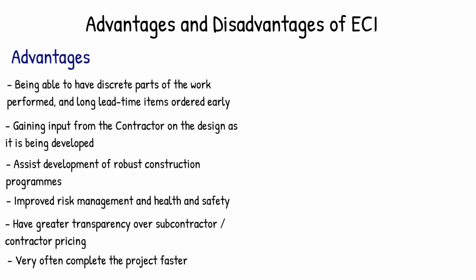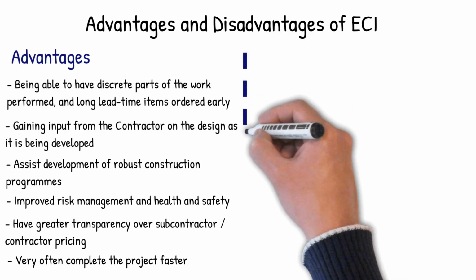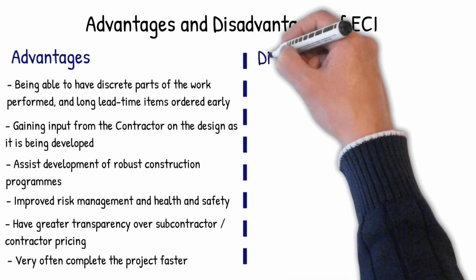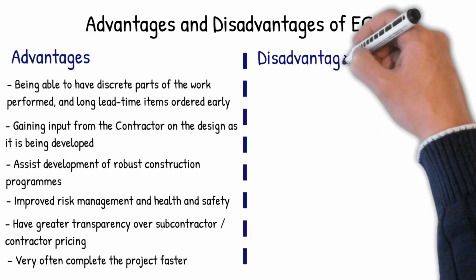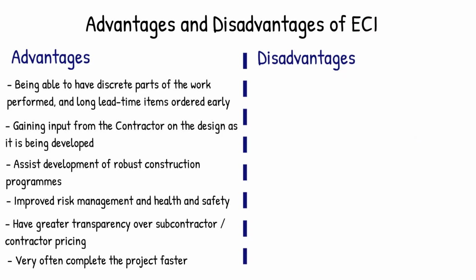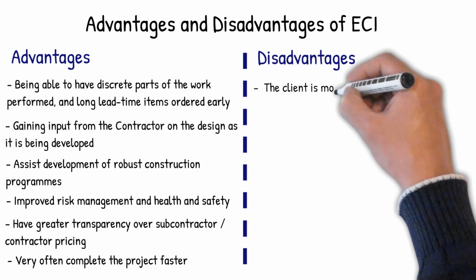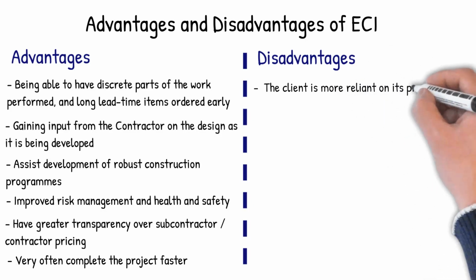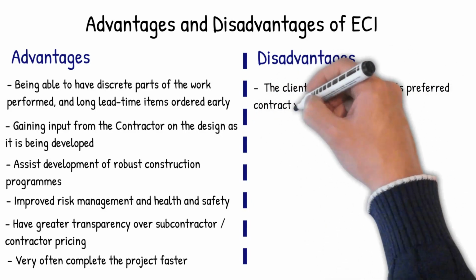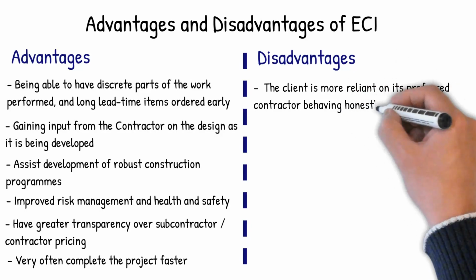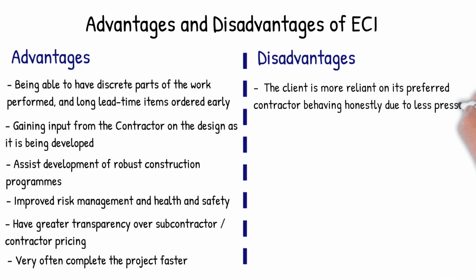Despite all of the advantages of ECI, there are of course some disadvantages as well that need to be considered before choosing to adopt ECI on a construction project. Within ECI, the client is more reliant on its preferred contractor behaving honestly. This is because the contractor will likely oversee the subcontract tender process and provide budget advice without having the usual